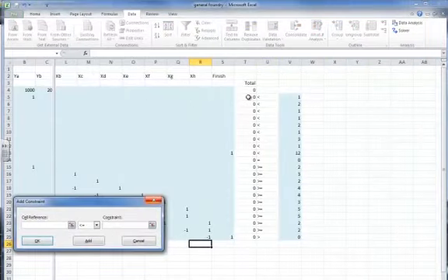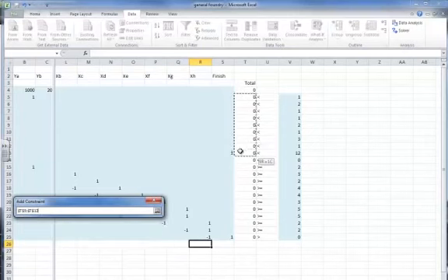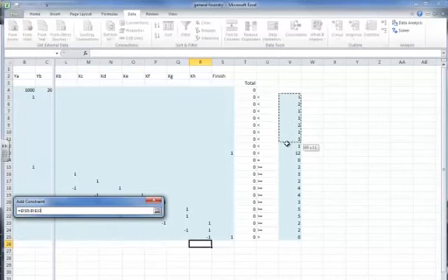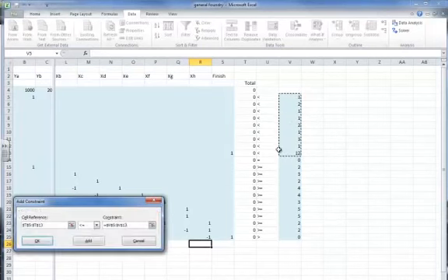are several. My first set of constraints have to do with the less than symbol. So my cell references start here, and then less than or equal to. And even though this is less than, it's the same as less than or equal to for purposes of our simulation. And then my constraints have to do with these cells.